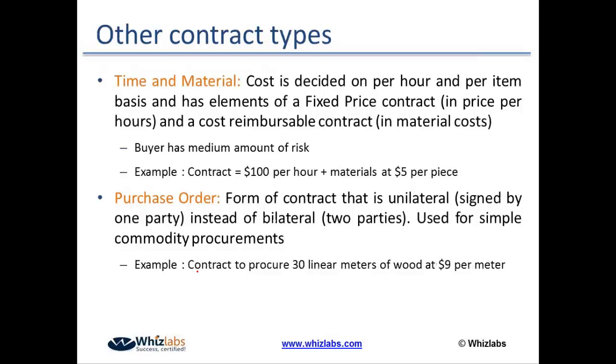So as the solution is not known to anybody, the only option is to go for a time and material contract. IBM would have a contract with me that we would fix this issue at, let's say, $100 per hour, plus whatever hardware is required has to be paid by you. That's an example of a time and material contract.